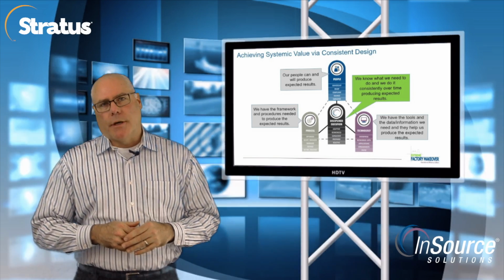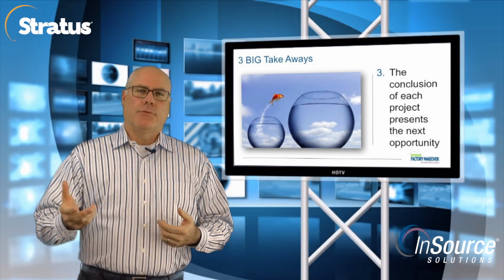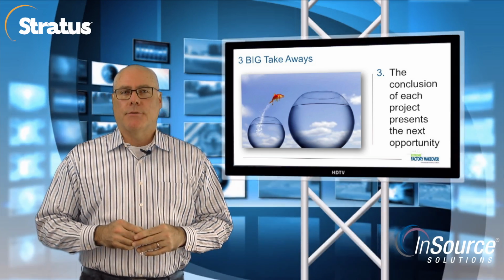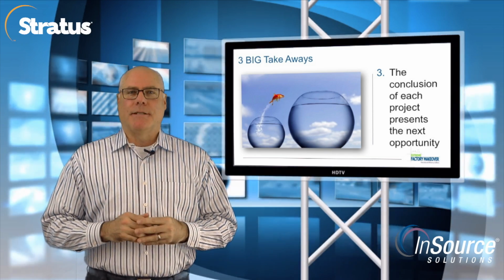All right, we're in the home stretch. Let's talk about the long term. It's said and been proven true that 80% of the opportunity cost or potential for success is determined in the first 20% of the project. Those early design phases.